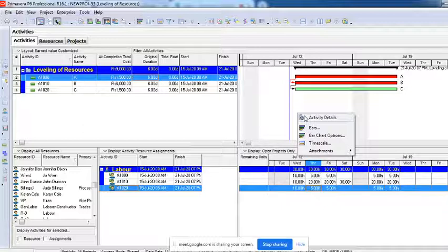Your resource manager or your portfolio manager or your PMO, the project management office, will allocate some committed resources to you. It is known only probably 8 or 10 days early, depending on the priority or criticality of the project. In some projects we come to know our committed resources just 3 or 4 days before also. In that case, what will happen? This becomes so important. How do I work with the resources which are available now?